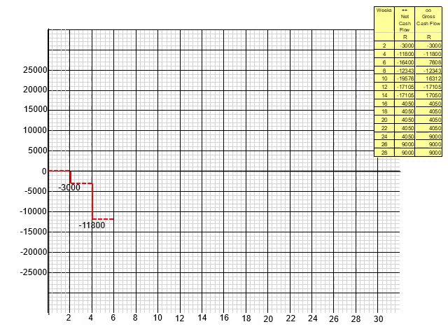Continue with the dotted line on the horizontal scale, up to week 6. The worksheet indicates gross cash is negative by 16,400 Rand. So, draw a solid red line, negative on the vertical scale, up to minus 16,400 Rand, and record the amount. However, the worksheet also indicates that net cash is positive by 7,608 Rand.